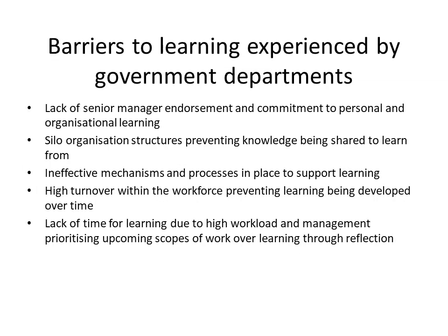What are typical problems in real life to learning? And this is from government departments: lack of senior manager endorsement, silo structures stopping knowledge being shared, poor processes and mechanisms, high workforce turnover so the learning and experience is lost, and lack of time due to high workload and management prioritising shortcomings.